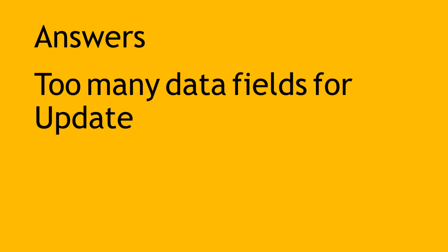Many team members consider this as an overhead which does not add value to their work. One of the major reasons which I have experienced is that there are too many data fields which are required to be updated and only a few data points are actually important and relevant for reporting the health or status of the overall project. My suggestion would be to review the fields which you are asking the team members to update, and the relevance and uses of capturing those data elements. Automate as much as possible the data capture in the tools and systems being used.